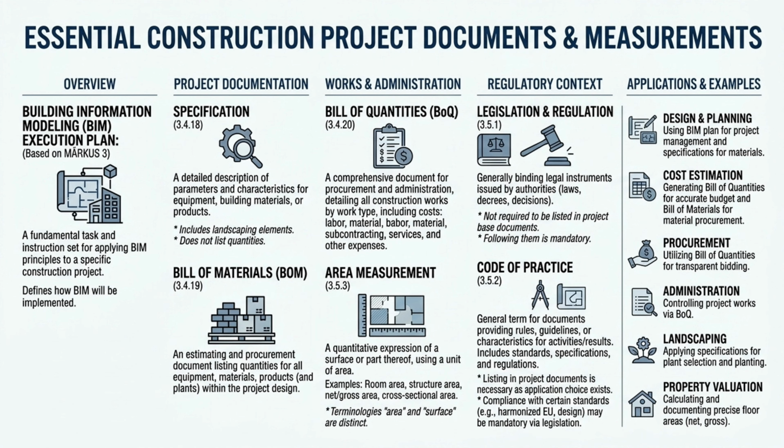The Bill of Quantities, or BOQ, is a comprehensive document used for procurement and project administration. It details all construction works by work type and crucial information, cost, and so on. The BOQ is essential for transparent bidding and controlling project expenses during the execution.